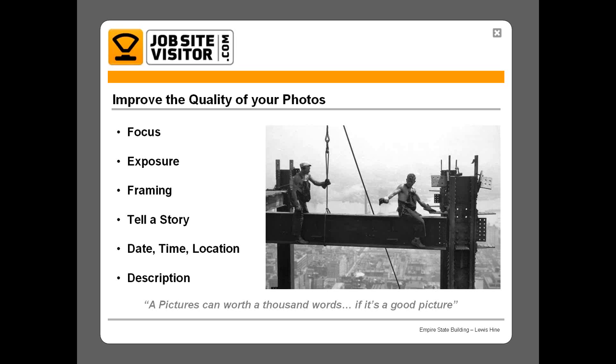You'll also want to make sure that you've got your date and time setting correct on your camera. I can't tell you how many times I see the date and time settings that are incorrect. This is important because a lot of this information is transferred into the metadata of the image. And if you've got the wrong date and time on all your photos and you've got 5,000 photos, it's a kind of pain. You'll also want to use the date stamp if you have that option on your camera.